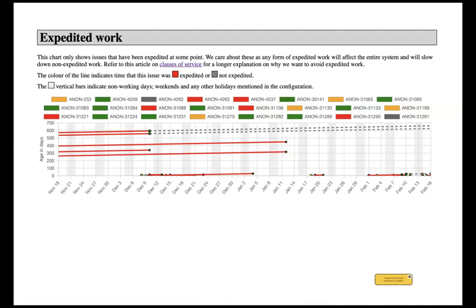In this case, one thing you can think about is if you go ahead and focus on rank instead of priority, it forces you into a more meaningful conversation. This item is ranked higher than the other. Yes, that is true. But in a general system, if we really want to get to be flow efficient, the algorithm we should use is the longer it's been in progress, the more important it is. So the item that's been open for 30 days is more important than the item that's been open for 2 days. That will give us the highest flow efficiency. Or we might have an insight that it's no longer important. It's just sitting there. That's true. Yes, it might be that it should have been canceled and it just didn't get canceled. That is true.